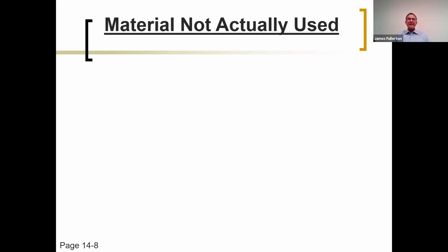However, it is necessary, again, this is just the case law, the statute doesn't say this, but the case law has been pretty consistent that you do have to actually deliver the materials in order to have bond rights, because you have not supplied those materials for the performance of the contract until you have delivered them.